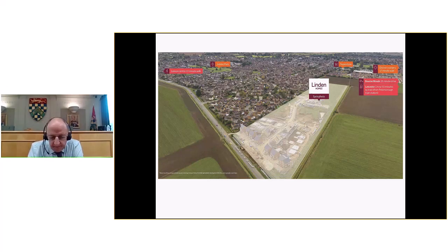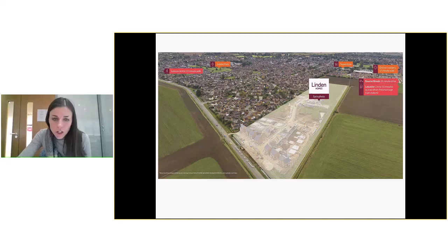Thank you, Phil. Georgina, would you like to respond to that so far? Yes, thanks, Councillor Dilks, for your question. Firstly, I'd like to apologise for the inconvenience caused while we've been using the Birchnell Close access. Most of you are probably aware that the bridge is now constructed off Lynchfield Road, but it has meant all construction traffic going through Birchnell Close into the site to be able to construct that point of access. We have tried to engage positively and respond to complaints as and when they come in, and I hadn't heard of any for a few months until I spoke to the planning officer, Phil Jordan, ahead of this committee. So if it's something that members feel they need to add in terms of a condition for a construction management plan to be agreed with the local authority, then we would, of course, be willing to accept that on the approval of the reserved matters.